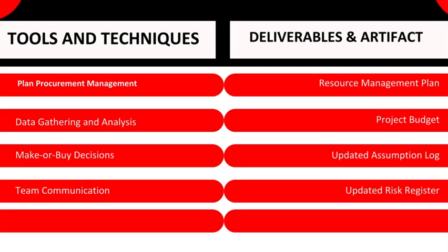The team leader then implements the procurement plan. This involves contacting potential suppliers, obtaining quotes, and negotiating contracts. Once the team leader has procured all of the required resources, the team can begin working on the project. By using a procurement management process, the team leader can ensure that the team has the resources it needs to complete the project on time and within budget.